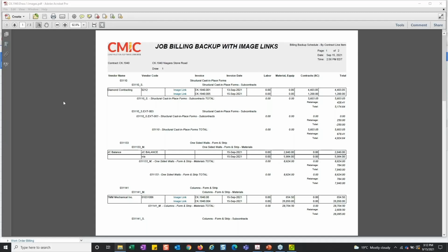If you've set up WBS at the company level, then yeah, most of your cost transactions are now going to have WBS codes available for those different transaction screens. And if you've posted transactions against it, then you effectively have to use it going forward. However, in, I believe, patch 13.2 or 14.1 for enterprise clients, we've made WBS by job. So now you can have WBS codes and values unique by job.